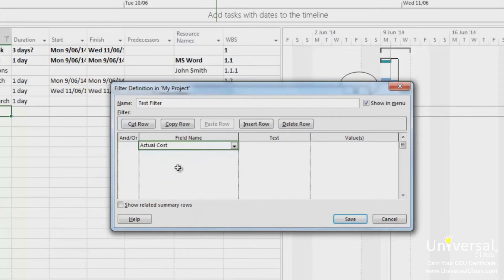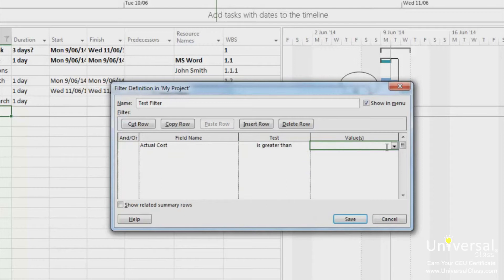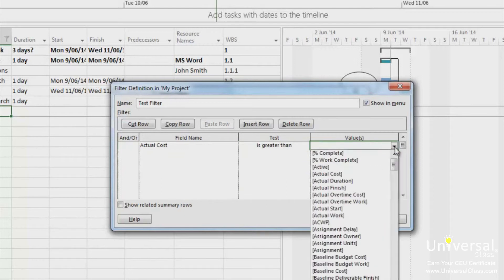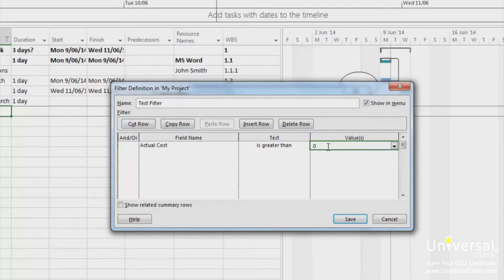Repeat these steps for the test and the value columns. Test means a condition that must be met. And value is a value that you enter such as a date or cost or a predetermined value such as baseline cost.